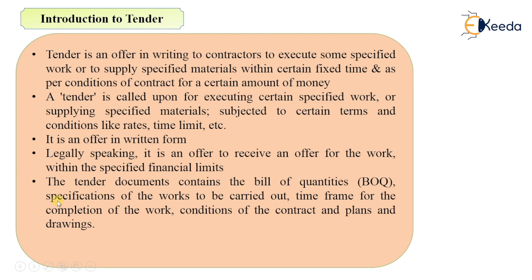The tender document contains the BOQ — that is Bill of Quantities — specifications of the works to be carried out, time frame for the completion of work, conditions of the contract, and plans and drawings. BOQ we have seen in previous videos; you can watch that video. Specifications we have also seen — it is the description of item of work. The time frame the contractor has to complete the work is also mentioned, along with the conditions of contract. Plans and drawings will be provided because you have to carry out the work as per the drawings and plans.